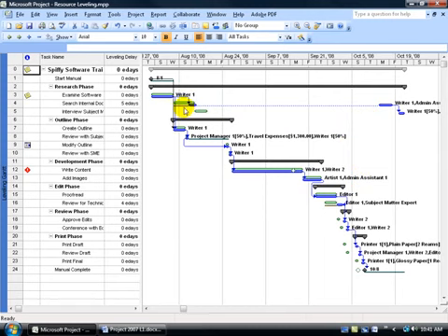So there's the first elapsed days, the first split task, and then as you come down here, the next elapsed was this task right here, and you can look over here in the entry table. It went 4 elapsed days. So the green bar again, what it was originally before it was leveled, then the blue bar, and then the gray line says we elapsed 4 days, and then we started that task after we used the leveling feature in Project.